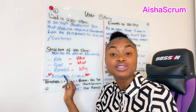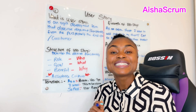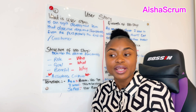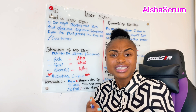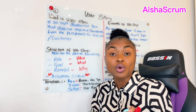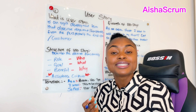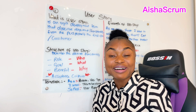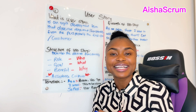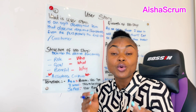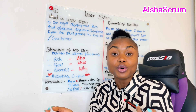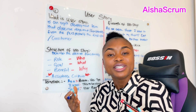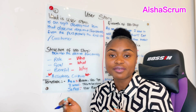The next most important thing a user story must have is acceptance criteria. Acceptance criteria describes how success would look like — with all of these requests, how would it look when it's completed? That's where acceptance criteria comes into place. We can't have a user story without a well-written acceptance criteria. The user story will always have the who, what, and why, describing the role, goal, and benefits, and it should also describe what it would look like when the development work is done.